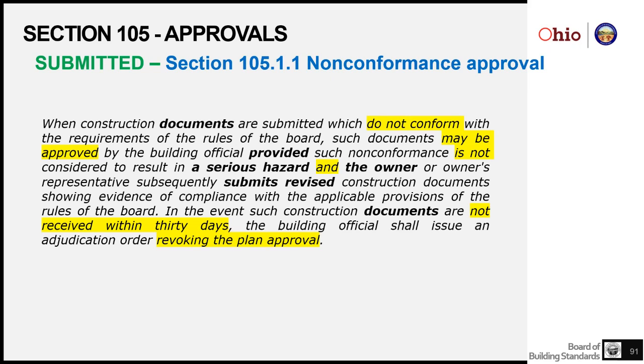but there are contingencies on that approval, that whatever portions are not approvable, the non-conformance items, will not result in a serious hazard, and that the owner agrees to submit revised construction documents to clear up those non-conformance items.